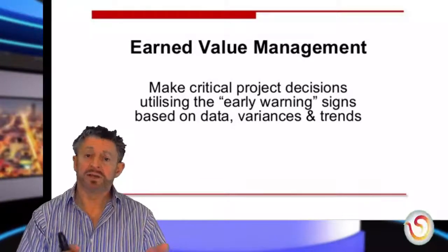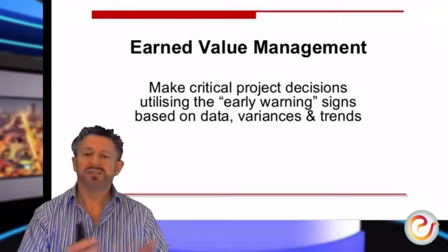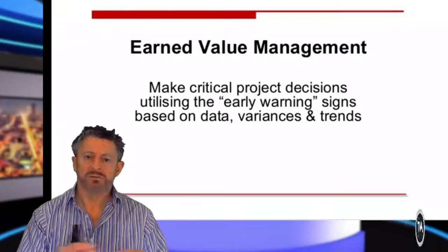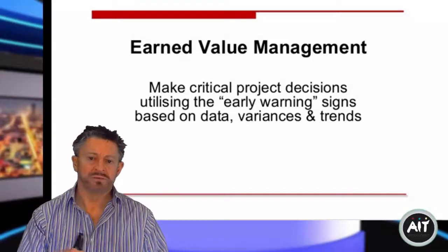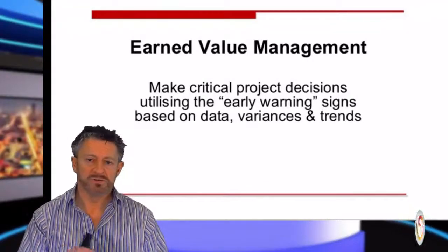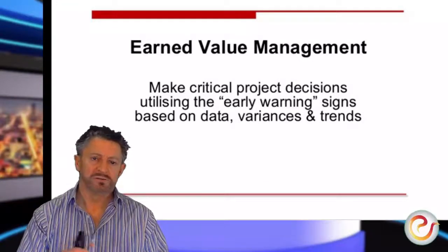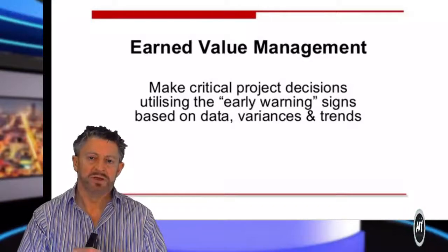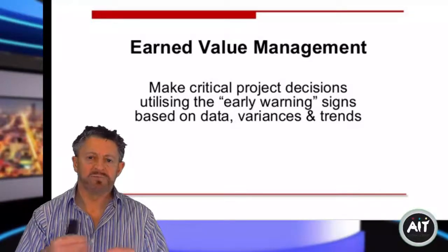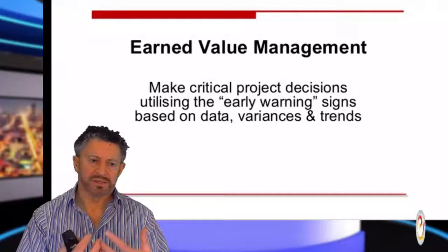How much of that activity have you completed? I've completed 60% of it. How much time have you taken? I've used 70% of my time. I should be only using 60% of my time. Will you come in on target? Probably. So you might get that.